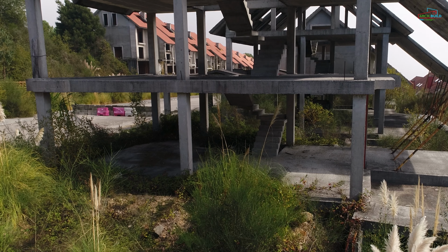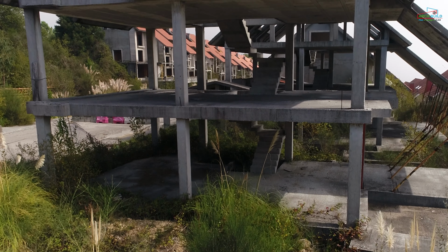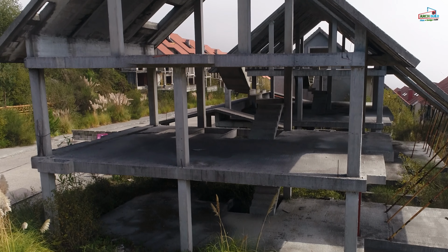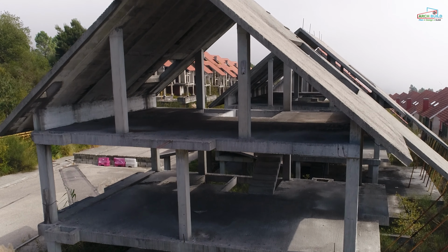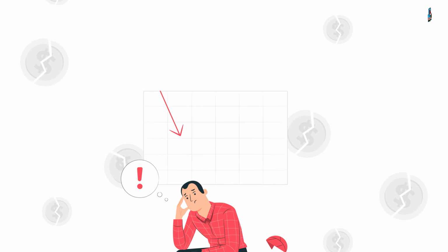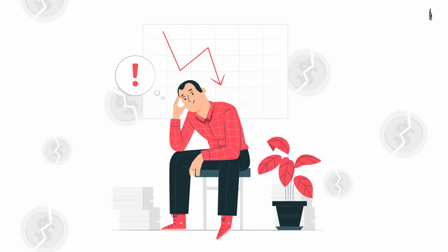Basically, phased construction is the efficient optimization of resources on a project, especially construction, based on different parts or phases, since usually you don't have all the money or all the finances to run the entire project. So the project is usually broken down into phases so that you can easily engage your finances and properly appropriate them to finish a given phase.